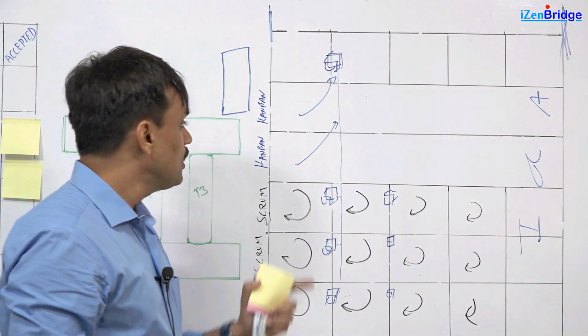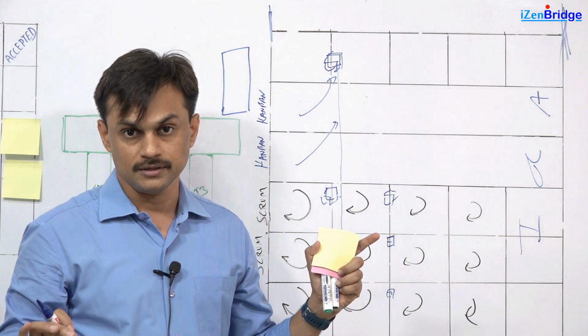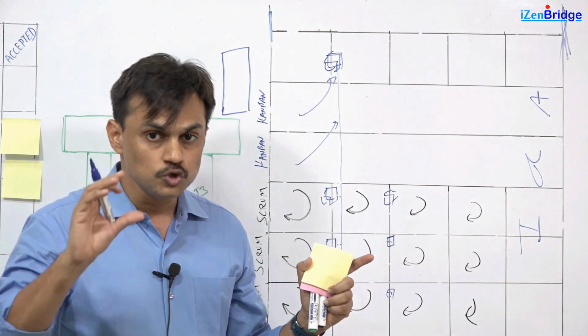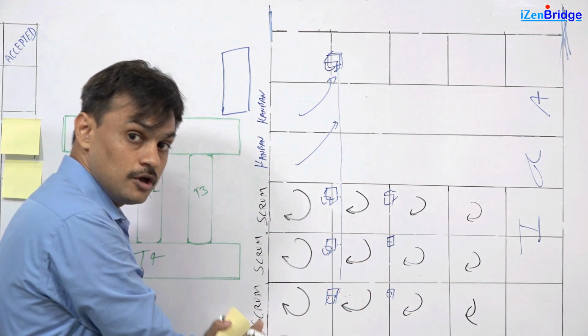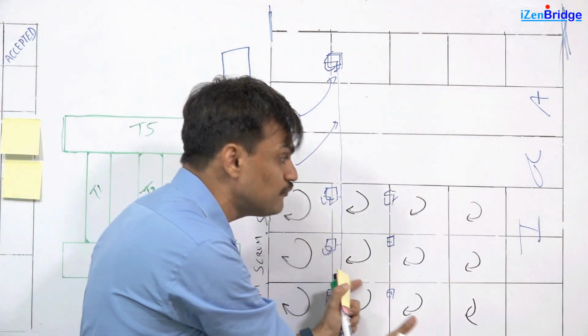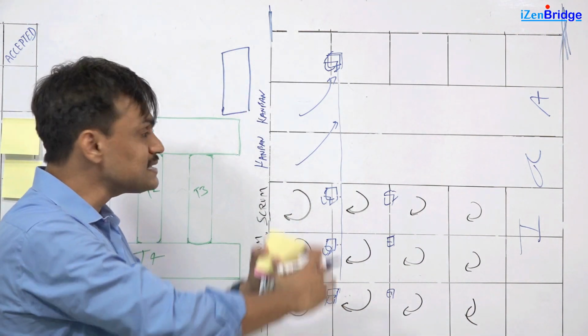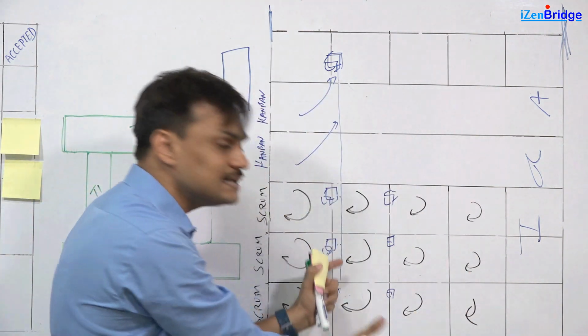So all in all, the Kanban team also ends up doing estimation of their work items, and those estimations should be normalized with the Scrum teams, because in a SAFe environment we do have an aggregated velocity, aggregated forecasting, aggregated sizing of the complete release train.